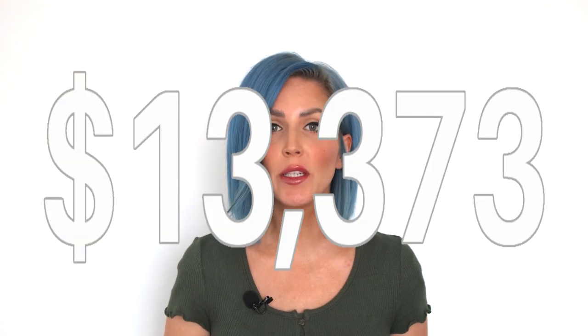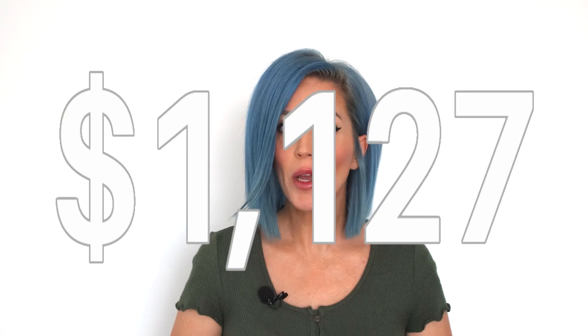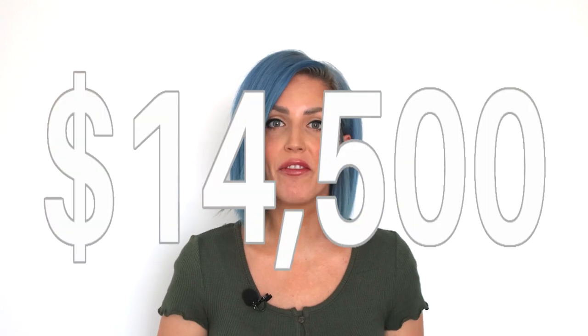The cabinets for our kitchen and laundry room cost us $13,373. The additional IKEA cabinets for our bathroom cost us $1,127. So in total, we spent $14,500 for all the cabinets for our entire house. That was actually $500 under budget.